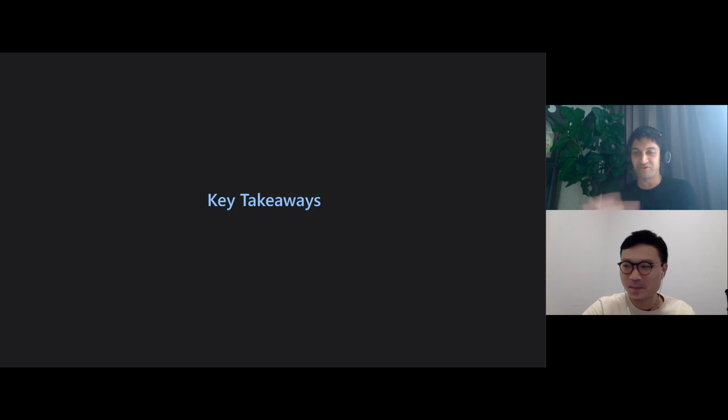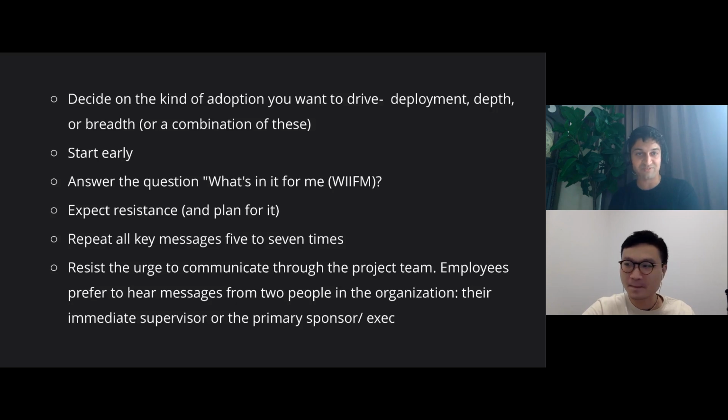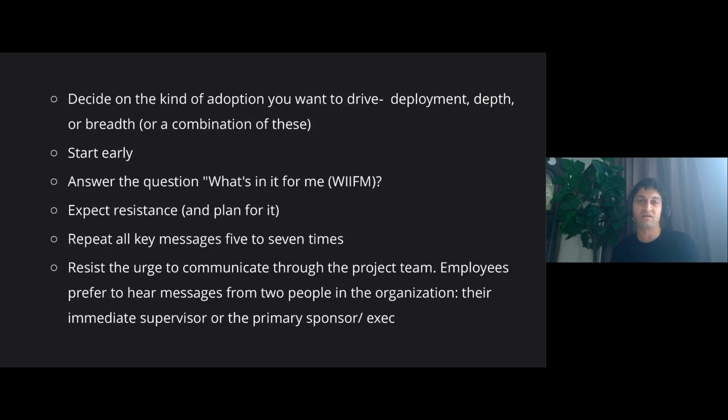So even if you ignored everything I said earlier today, I just wanted to leave you with a few key takeaways, and hopefully this is helpful. So the first thing is, from an adoption perspective, deciding on what you want to drive. Right? Is it deployment? Is it the depth? Is it breadth? Or is it a mix of these? Or is it all three, possibly? The second thing I can't reemphasize enough is starting early. So getting involved even before the customer is signed, ideally, but if not, at least when they sign and kick off the whole journey, right? So being involved right at the start is absolutely crucial.